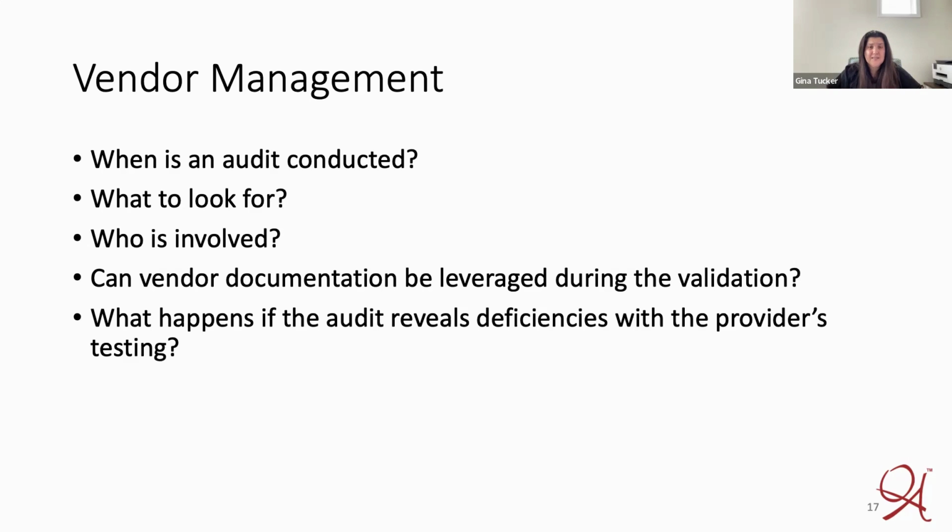Ideally, a vendor audit is or should be conducted prior to purchasing the system. It can be done after purchase, but prior to purchase gives you an opportunity to provide your audit feedback into the purchasing decision. You may want to consider gathering the audit team prior to the audit and assigning individual focus areas based on your team members' expertise and their experience with using that particular system or a system similar to it.